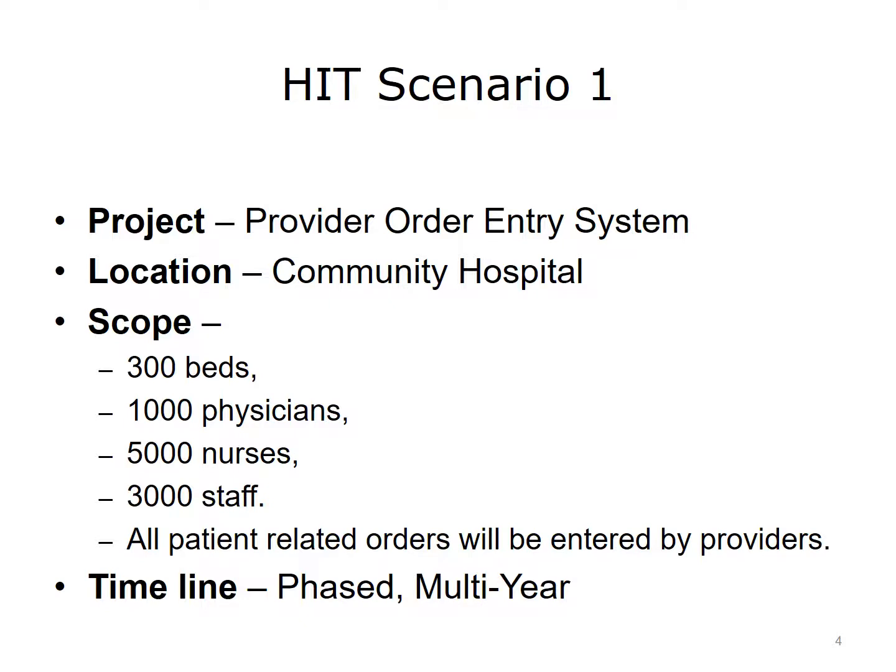The scope of the project begins with upper management, who might not be participating directly as users of CPOE, but who decide for whom the business rules apply. For instance, the threshold level of drug-drug interactions to worry about, or the identity of ancillary staff and the types of orders they may review. Others are involved at this overall scope: physicians, who interact with the system and will want a consistent look and feel from any location in the hospital, the ancillary staff who receive the orders and must process them, and the IT staff that has to decide which data of all these interactions should be stored and where.